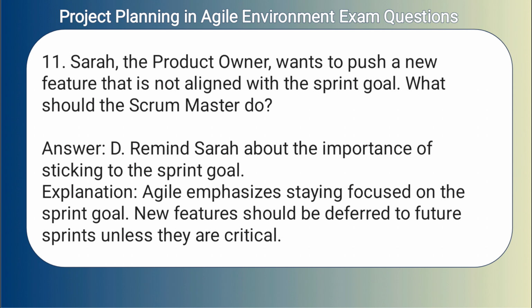Answer: D. Remind Sarah about the importance of sticking to the sprint goal. Explanation: Agile emphasizes staying focused on the sprint goal. New features should be deferred to future sprints unless they are critical.